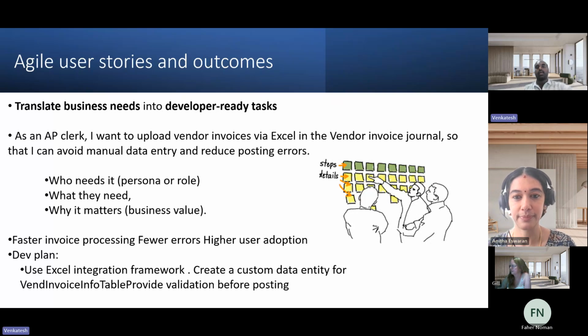Yes, of course. And thank you, Anita. Functionally, many of the requirements were good to have. So you have to see whether it is really giving you impact on the process and adding value. If not, just propose a workaround and go ahead. That is my standard recommendation, because if you do development, it also needs maintenance, and every release you have to make sure all your developments are tested before you go to the next phase.